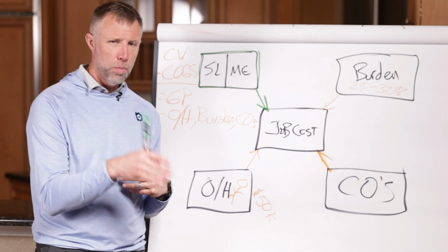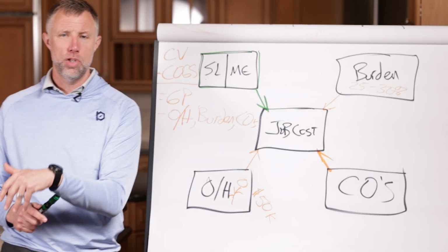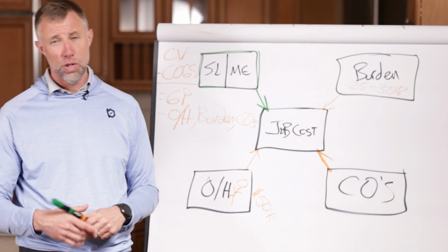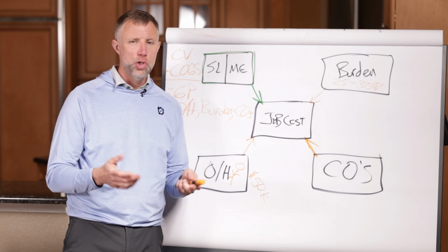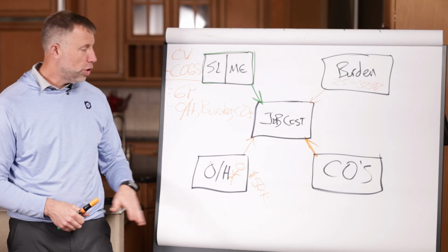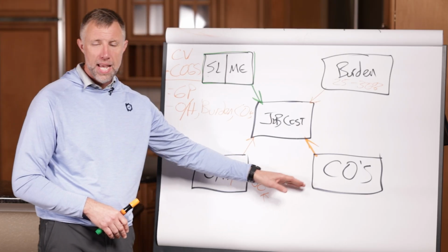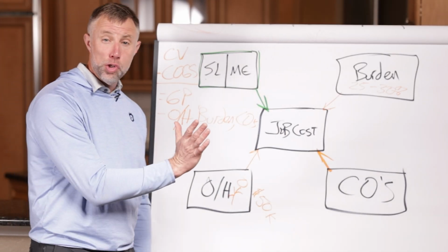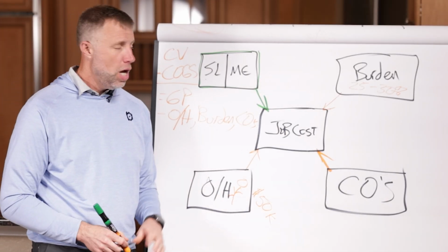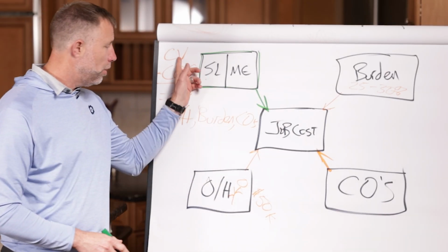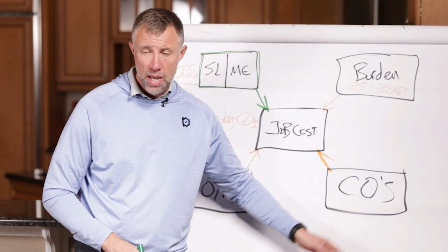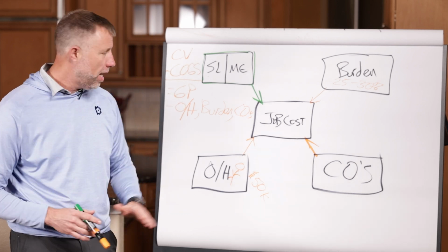Hey, you told me the total project was going to be $1 million, now it came in at $1.2 million, and you're like, well, there's $200,000 in change orders that you agreed to, but they still don't feel that in the moment. They just feel the joy of that until the bill comes. And so you need to manage these really well and understand, if you were to go back and look historically at the bids that you've done, you could usually see what percentage of those contract values are impacted by change orders. In fact, that's a pretty simplistic way to look at all of this.